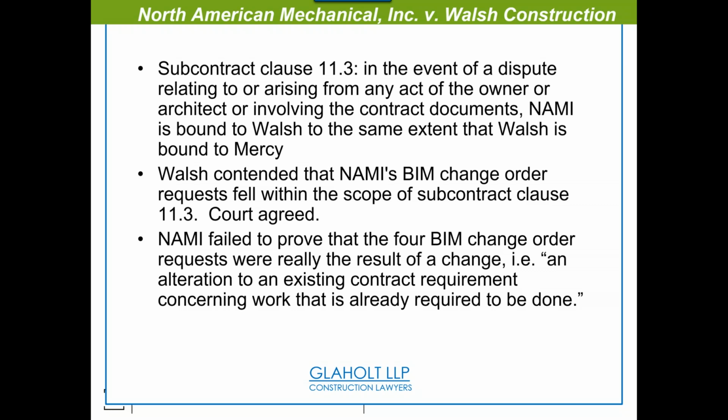The premise of the contract documents was still laid in place in 2D. So it's an interesting BIM-related item that failed, but it was trying to say, hey, look, here's your deliverable, 2D drawings. That's why I'm very explicit on the assignments. Doing all these models, drawings are the deliverable, the contractual deliverable.